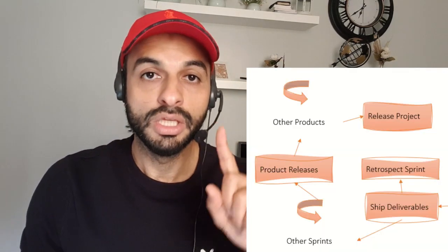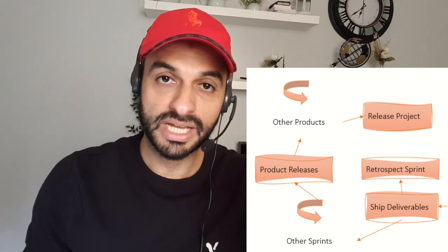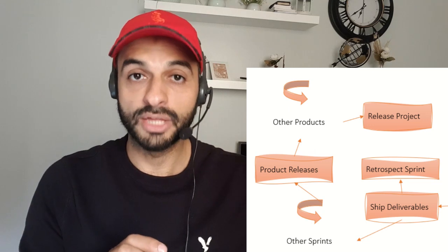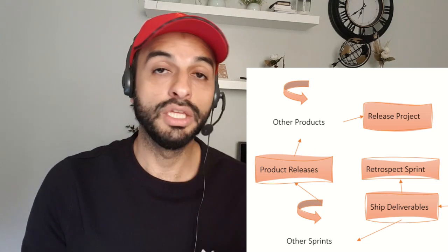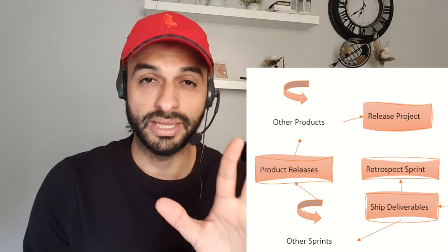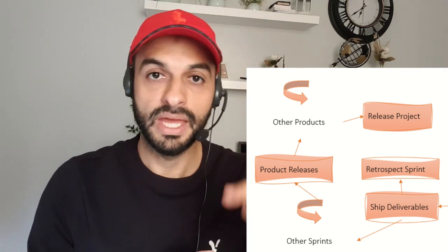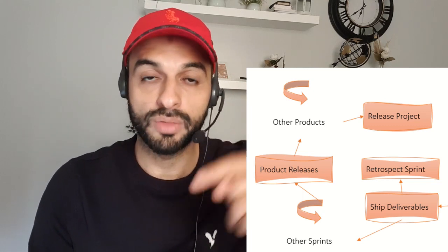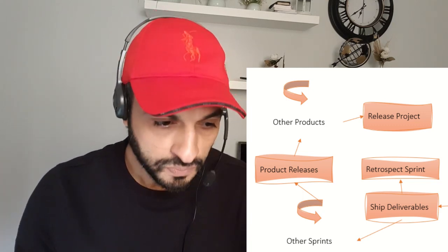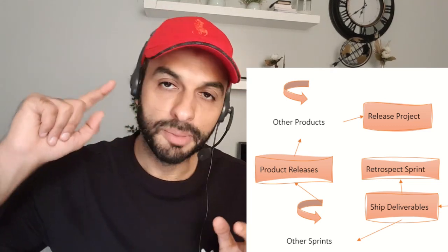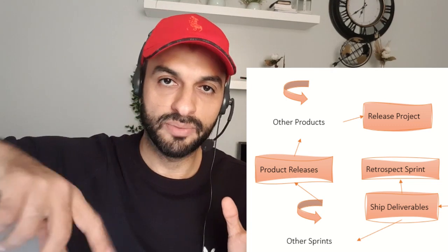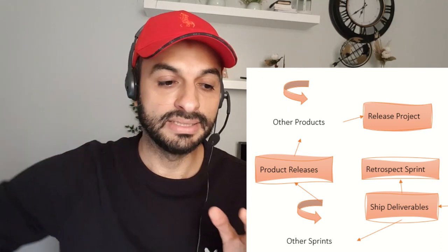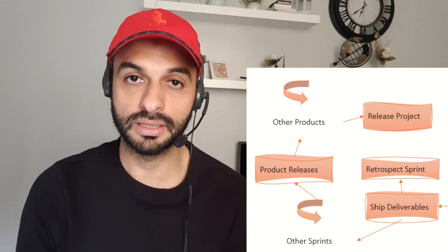No. You need to get confirmation from the customer on whether we follow the prioritized backlog that we made at the beginning of the project, or whether you need to change. Maybe the customer will say, wait, make product number 3 now instead of product number 2. Make it the second priority and move it up. So start with product number 3, like that. Then you repeat with the second priority, third priority, and some sprints you submit, until you release the whole project and get it done.